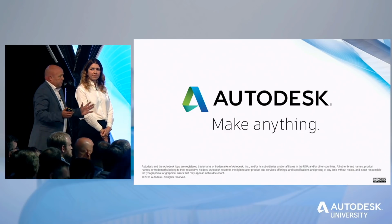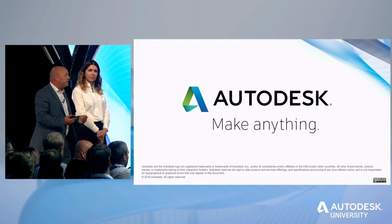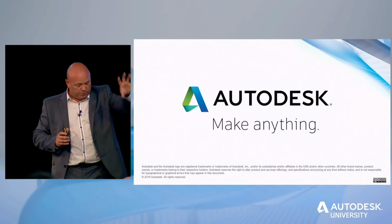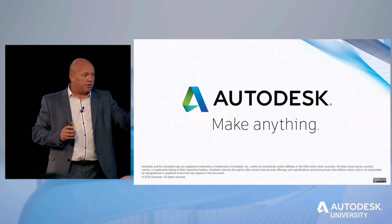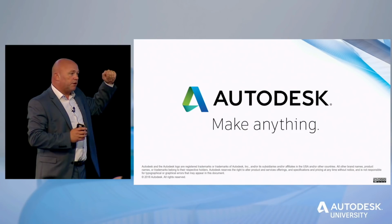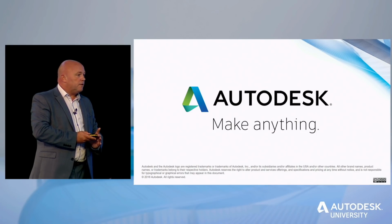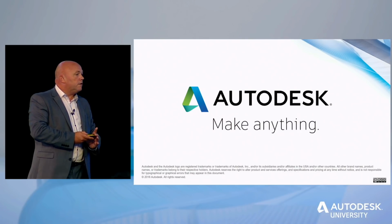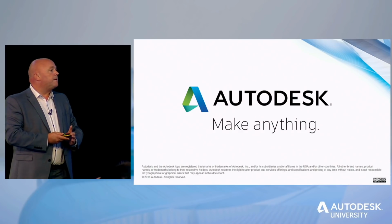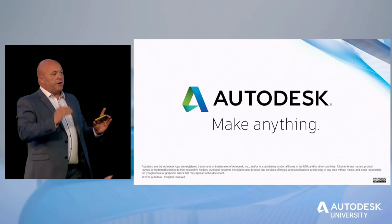Yeah, I mean, basically the system's open. So whatever information you'd like in the model into the field system, we can actually get it in there. Because as you bring the model through Glue into Field, this is classic version, by the way, bringing Revit through Glue into Field, we can map what data you actually want to see while you're out on site. And then the forms itself can capture the commissioning data that you want to bring back into the model for your life cycle records and as-built record, really. Yes. Yeah. So it's a full life cycle. So that you can map it back to Revit or schematics, which has an input into your design, which is the model, and also linked to your schedule. Right, so we can link a system.